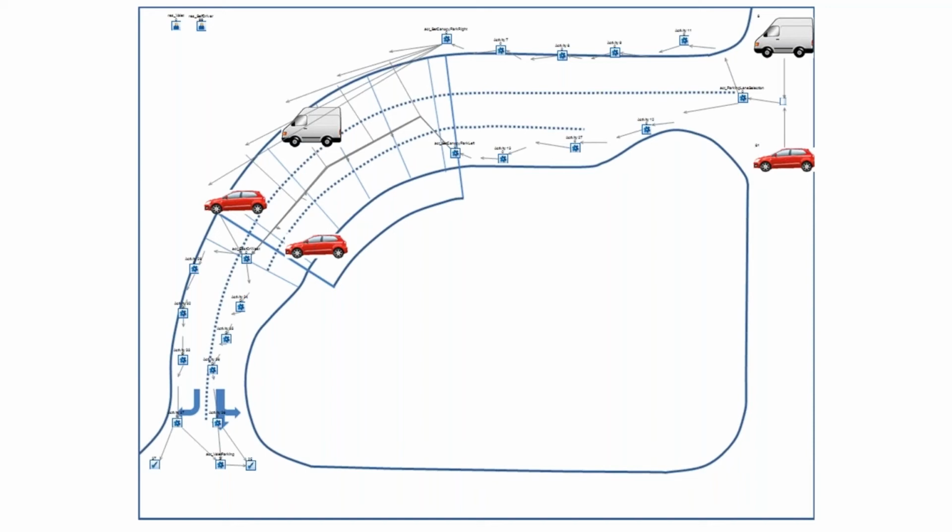Understanding our data, we knew that we had some level of observation data, and so we knew that we were never going to be working with a lot of distributions such as the log normal or the Weibull or some of the other distributions. Normal, definitely not something that we have a lot of opportunity to use within our data sets. Just understanding that it was going to be more time estimates, that's where we utilized the triangular distribution and the uniform distribution.